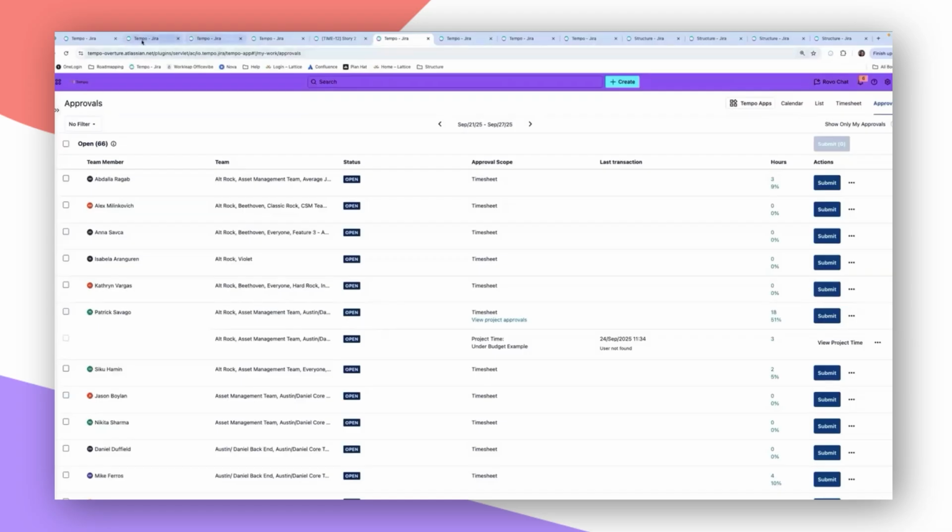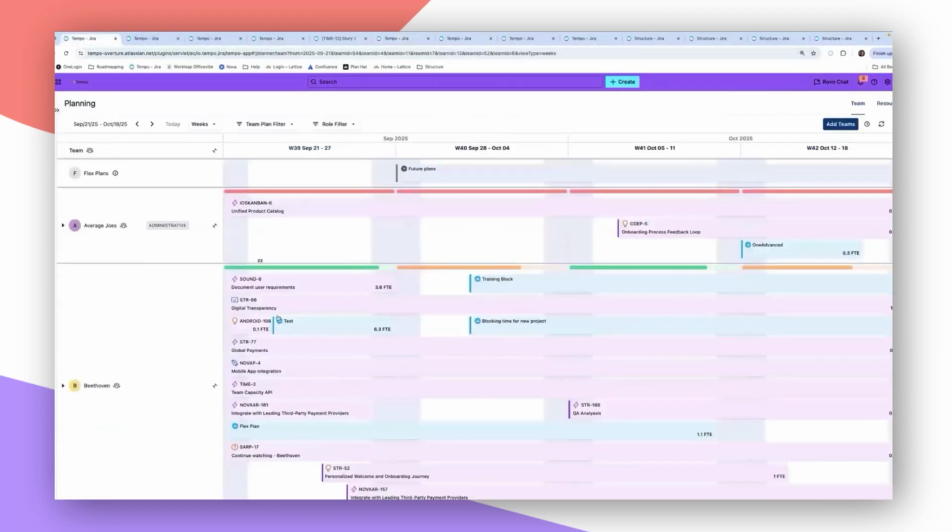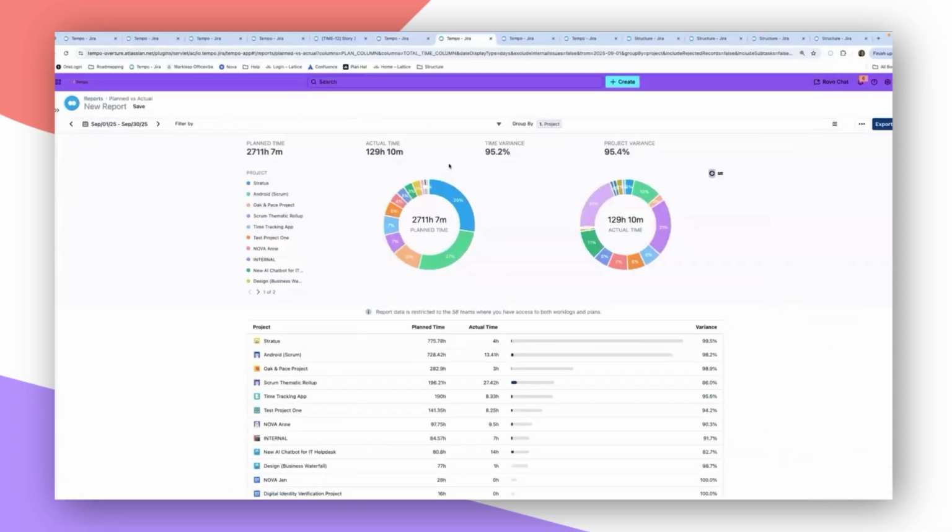So in Capacity Planner, where we set the plan and made this plan, in timesheets, we can now check, okay, what did we actually do? What did we actually spend time on? We planned for this. This is what actually happened. Did we actually spend the 40 hours we assigned to this, or was it 50? Was it 60? And when you see the difference, that's your opportunity to get smarter. This is where planning and execution connect. The more cycles you run, the better your planning gets.